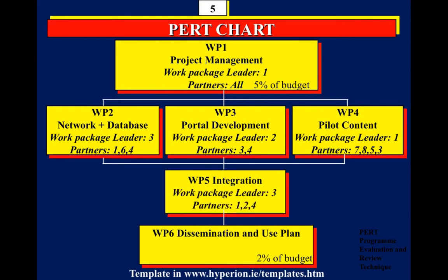Now, if you look at the slide under this in your notes, as an evaluator, I want to look for some things here. Now, if I see everybody in every work package, I'm not convinced. That means you never even discussed it. If I see one partner per work package, that means it's actually 6 little projects pretending to be one big project.